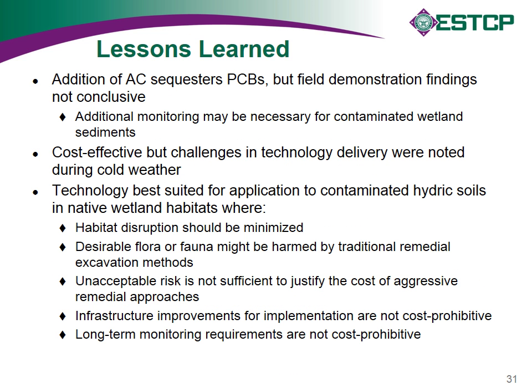In terms of lessons learned, the material was readily deployed with landscape equipment. I thought that was very positive. The movement of activated carbon was potentially a concern, and the dead stands of Phragmites were a challenge as well. I think on the spatial and temporal variability, we thought we had a well-characterized site, and in retrospect, we probably could have done more. The substrates in the lower high-value wetland are very different than in the Phragmites marsh. And I think understanding some baseline conditions a little bit more than we did might be very helpful.